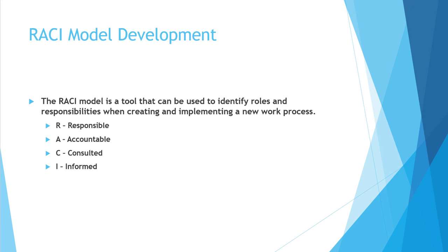So to assist in the creation of a work process for the outage coordinator, I used the RACI model. I felt that this model is the best way to lay out roles and responsibilities and to assign the proper people to complete the proper task. This way, everyone that is working the turnaround knows who is responsible, who is accountable, who is to be consulted, and who is to be informed every step of the way.